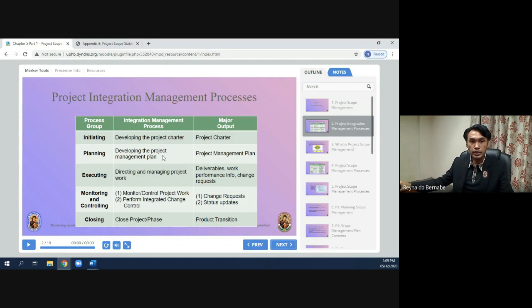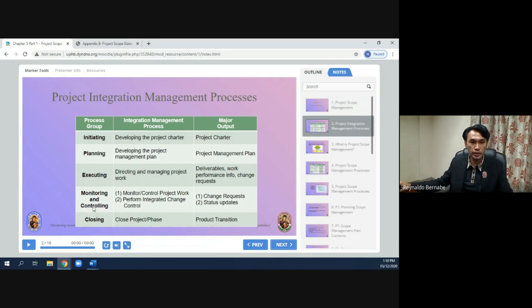Under planning, the integration management process is developing the project management plan, and the major output is the project management plan. The third one is executing — directing and managing project work — and the outputs will be deliverables, work performance info, and change requests. The fourth is monitoring and controlling, where the process is to monitor and control project work and perform integrated change control, with outputs of change requests and status updates.